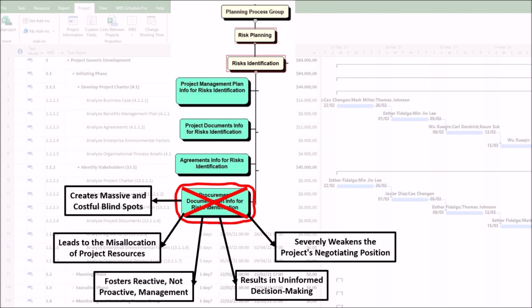For example, when a dispute arises, you are forced to rely on the contract's dispute resolution clause, which you never analyzed. You may find it mandates arbitration in a foreign country under unfavorable laws, a significant risk you unknowingly accepted.